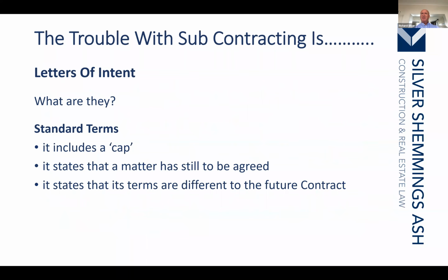So we've now dealt with contracts. We've identified that to have a contract in place, we must have an offer and acceptance and consideration. We must have clarity as to what has been offered and what has been accepted. Now, if we've got an offer that is uncertain, which has then been accepted, so it is uncertain as to what has been accepted, it may be the case that there is still no contract because the parties cannot identify what has been agreed.